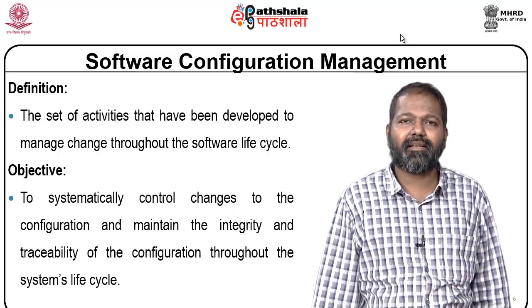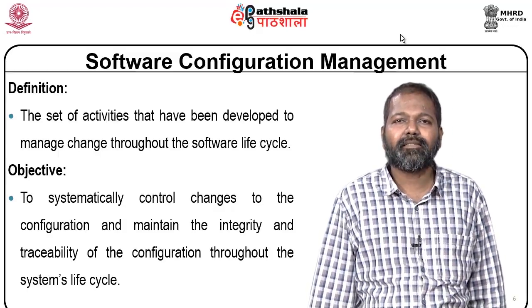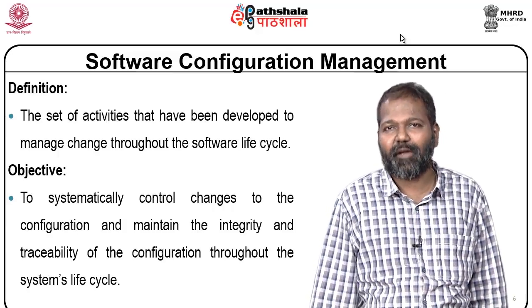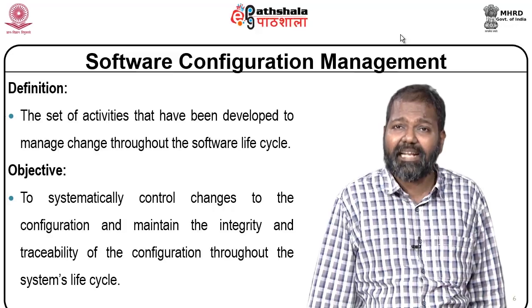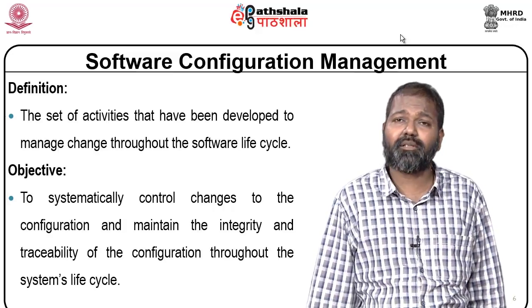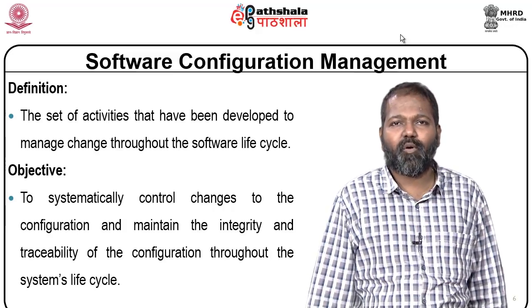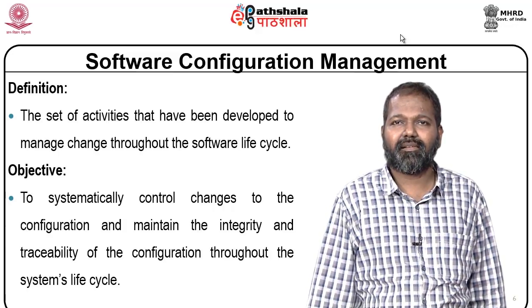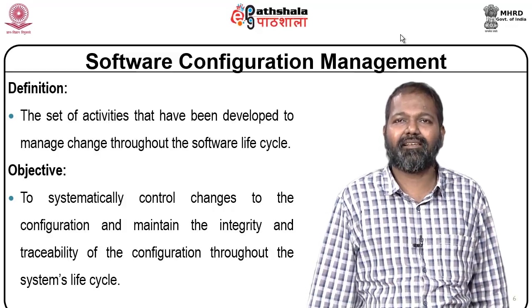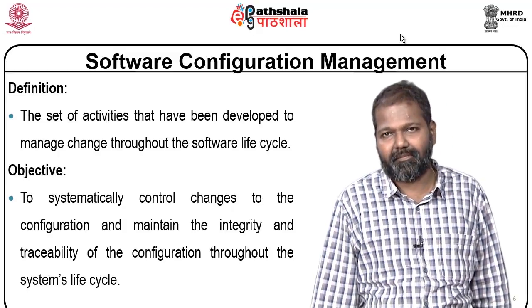Once testing is complete and the product is a quality assured software product, the product is deployed and enters the maintenance phase. During the maintenance phase, as I have stated, business process re-engineering activities will be carried out, and changing requirements will be addressed. As you move from one phase to another, if you want to address changing requirements, the cost increases.